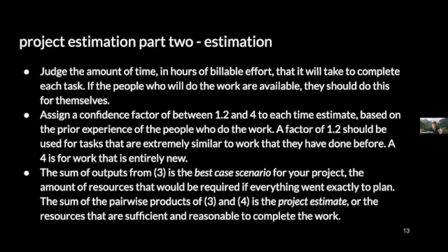For each of those tasks and subtasks, this is the estimation part, and it's a little spooky, but trust me, it works. For each of those tasks and subtasks, you want to go through them and estimate the amount of time on task, what as a consultant I call billable hours, the amount of time on task that it will take to complete each task.